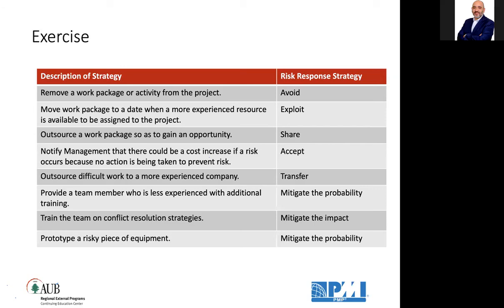Train the team on conflict resolution. I'm mitigating the impact يلي بيصير من جراء الconflict. Prototyping a risky piece of equipment. I'm mitigating the probability of failure. Okay?